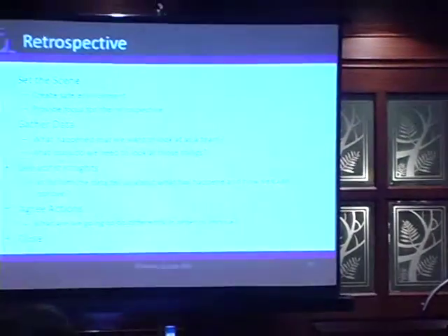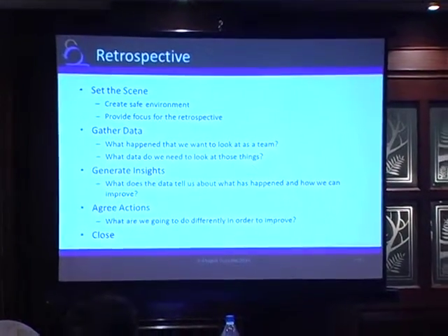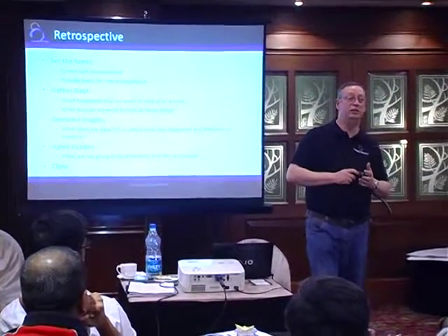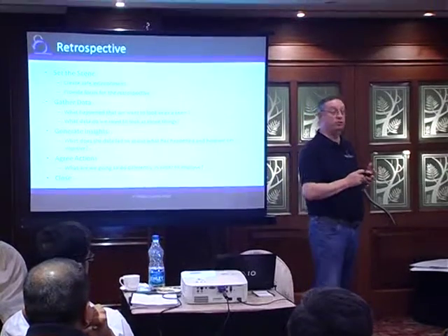One of the things for creating a safe environment is that everyone needs to speak in the first 10 minutes, without being judged. If somebody doesn't speak in the first 10 minutes, they get the message that it's okay to not speak.